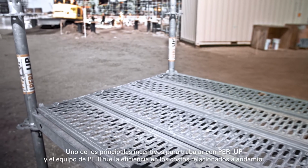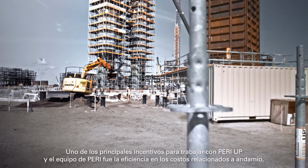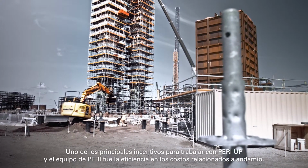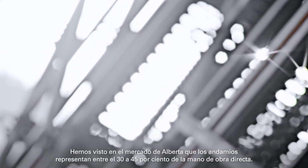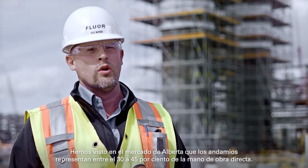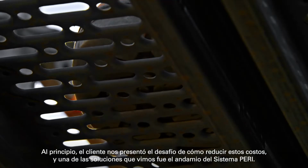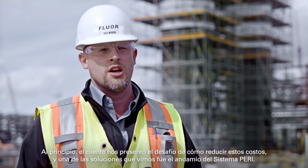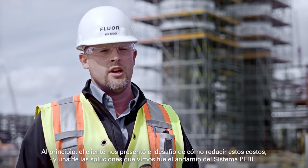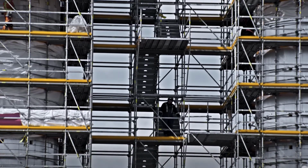One of the primary drivers in going to PERI Up in the PERI outfit was the efficiencies in scaffolding cost. We've seen in the Alberta market scaffolding become 30 to 45% of the direct labor. On the onset, the client asked us to challenge ourselves in how to get the cost down, and one of those locations we looked at was the PERI system scaffold.